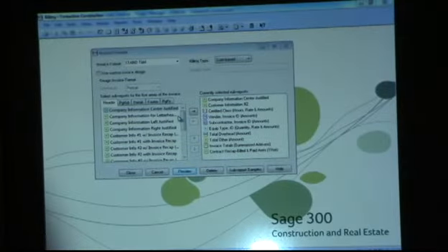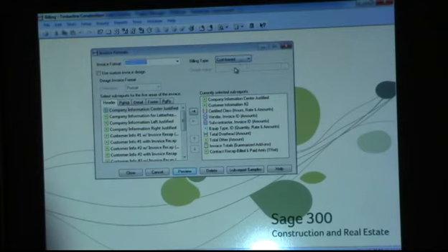The other way to do it is set it up as a contract job, even though it's T&M. Have your project manager look at what your costs are and then choose what to bill, which goes against everything else I said about not doing things twice. But I tend to lean towards the contract billing versus the cost billing because there's less setup, there's less risk of something not getting passed through, and it keeps the project manager in the loop.